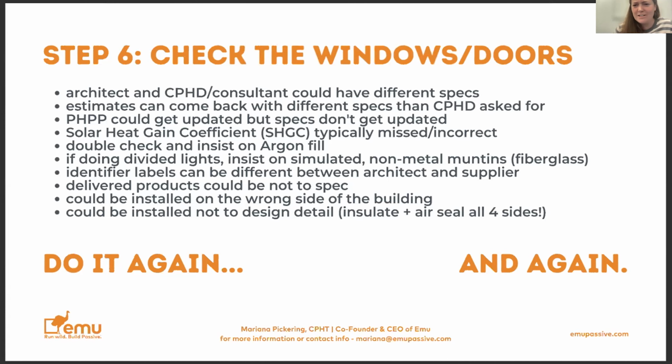One big thing we see all the time is just labeling. The labels that the architect has on the schedule somehow get changed when it goes to the supplier, and then they come back and they've got different labels. And sometimes they're both numbers or they're both letters, but they're not the same ones. And it causes a lot of headache and confusion for the builder, especially when the designer,